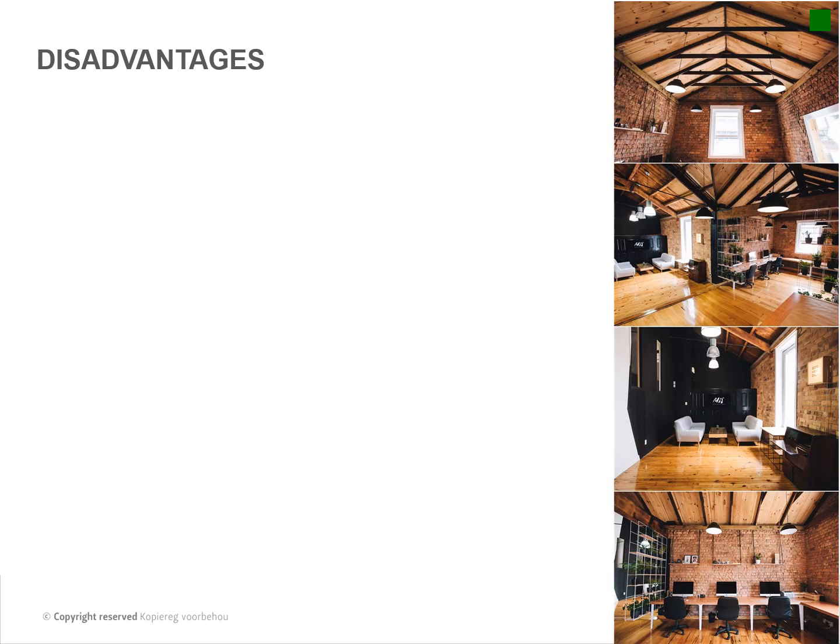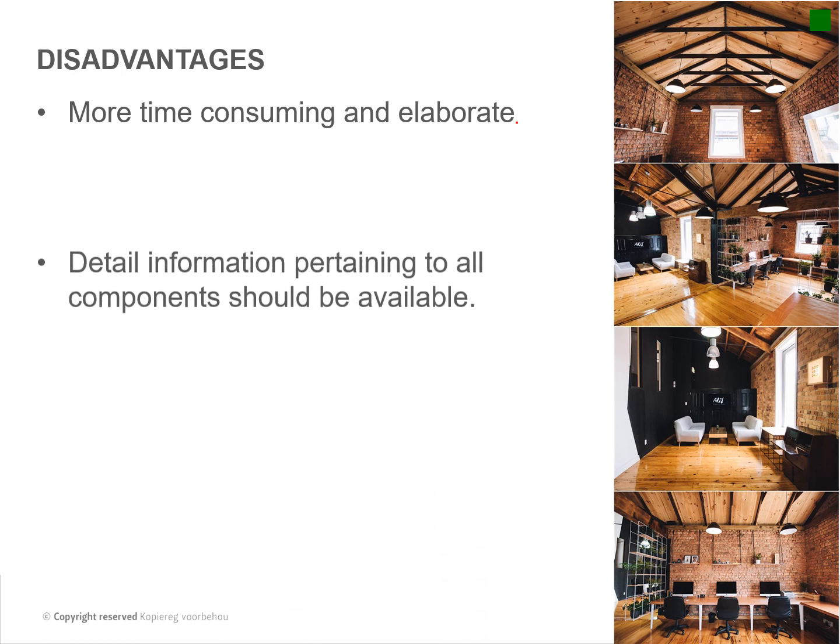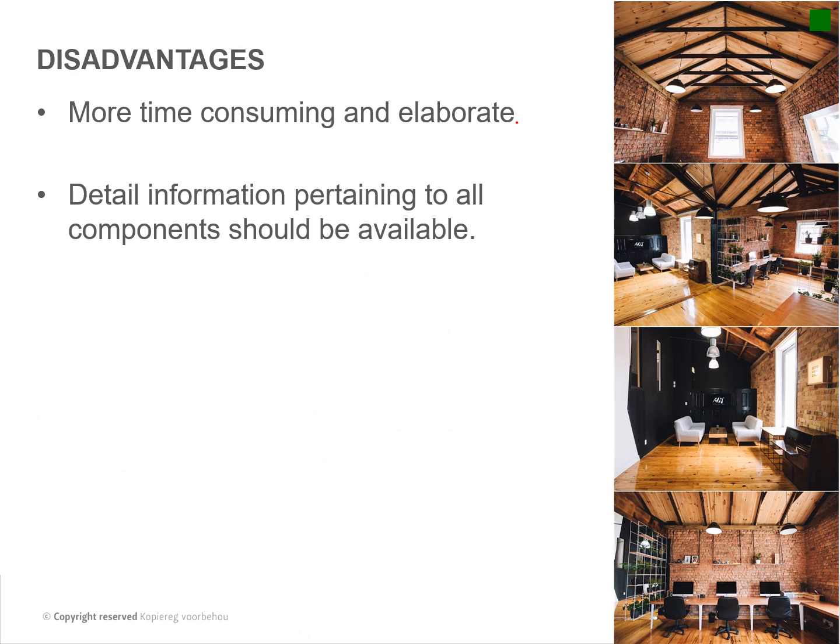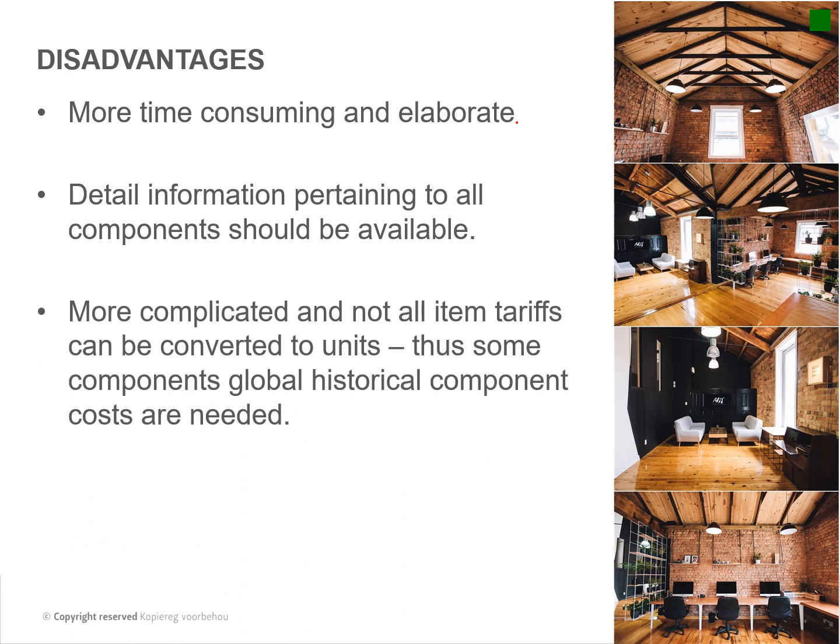Okay, so the disadvantages, pardon. It's more time consuming. Obviously, you're now going to measure each and every component. Detailed information pertaining to all components should be available. Okay, it's more complicated, and not all item tariffs can be converted to units.